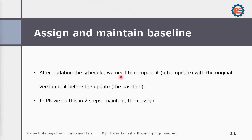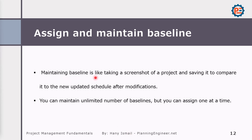After updating the schedule, we need to compare it with the original version before we can say we are ahead or behind. Maintaining the baseline is like taking a screenshot of the project and saving it to compare to the new update. We can maintain an unlimited number of baselines, but we can only assign one at a time. For example, you can maintain baseline number one, two, three, four — but you need to tell Primavera which one is assigned to this project in order to compare the data.